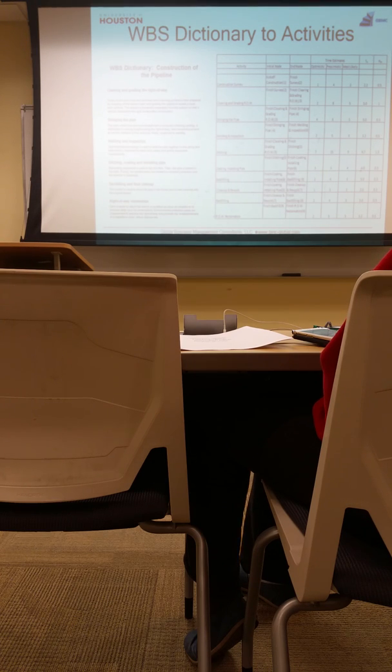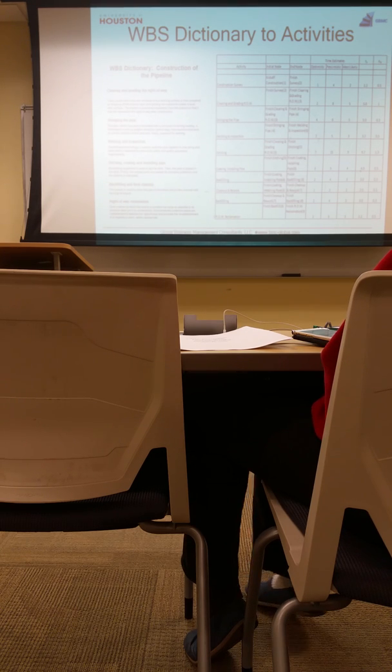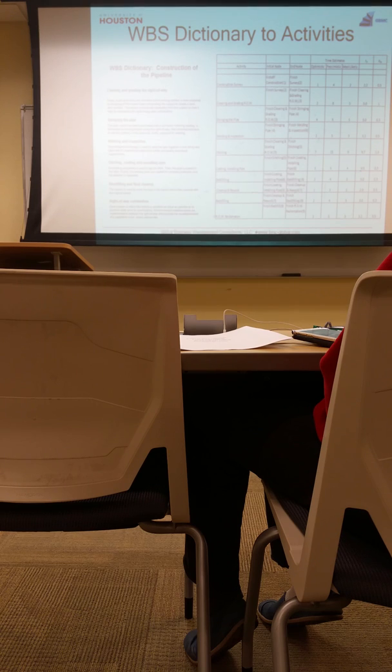Excuse me, the timeline should be based on the pessimistic or most likely? Well, that's a good comment. Probably not. It depends on how much confidence you want in your schedule. If you want 100% confidence that you're going to finish, then you base it on your pessimistic.